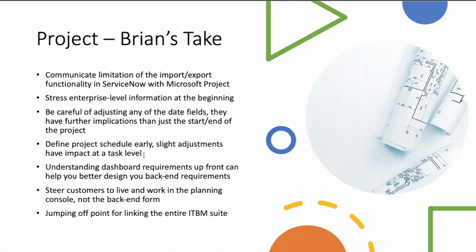That's typically the project schedule that they use, but ServiceNow won't export that schedule. They'll only export, I believe, the MS Project schedule. So if you have a project that you're trying to export, it's going to adhere to that schedule, and that may not be the schedule that they're using in MS Project. So then you run into a problem.